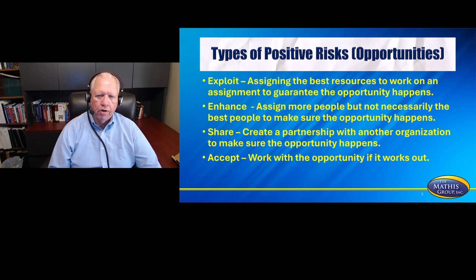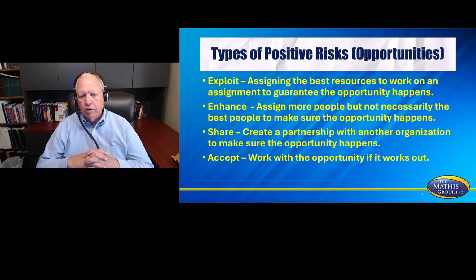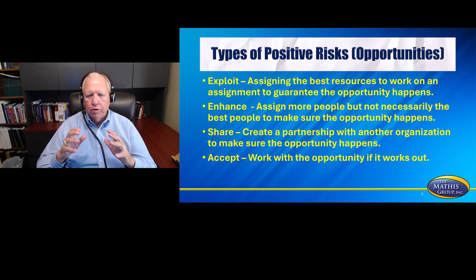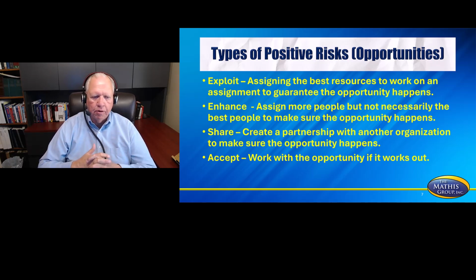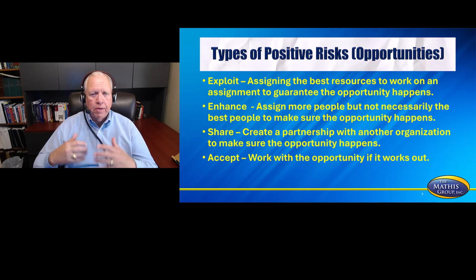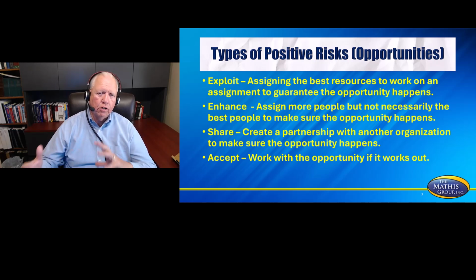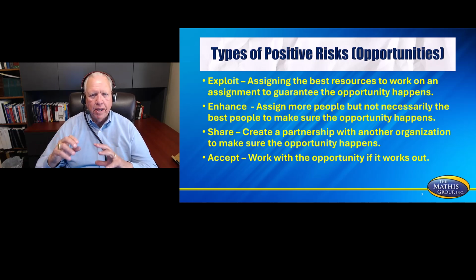Share is another strategy, and share, you're typically going to read in that scenario that the organization has brought in another organization or another company for some reason, and so they're going to be getting part of the fees of that, and so there's some type of partnership they've put together, and then the purpose for that is to make sure that opportunity happens. Just because you partner with someone does not automatically mean that it's going to be a share type situation.